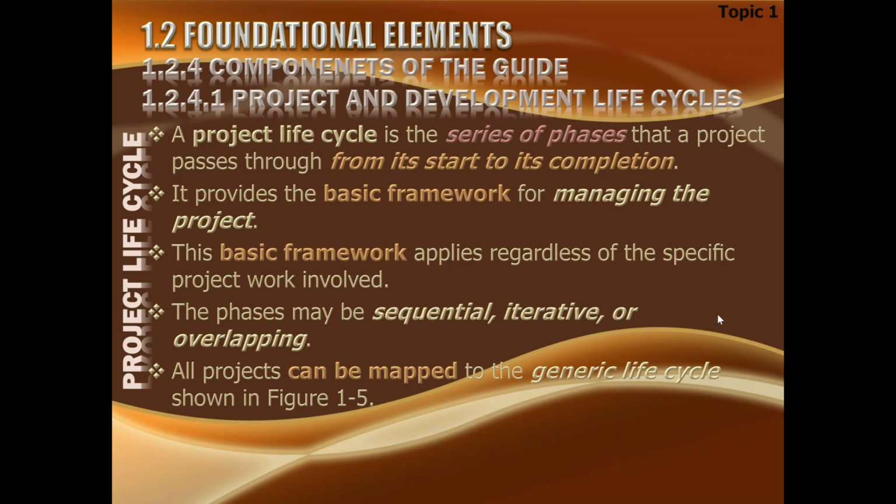Some of you have said that there can be an overlap in the phases. I agree with that, but I disagree that 2 phases can start together. Impossible. 2 phases can never ever start together. Yes, it is very much possible that one phase is not yet finished and you are allowed to start another phase. A little bit of overlap is possible, but calling it 2 phases starting together, that is criminal. So 2 phases cannot start together.